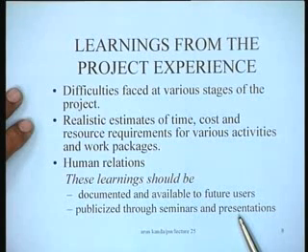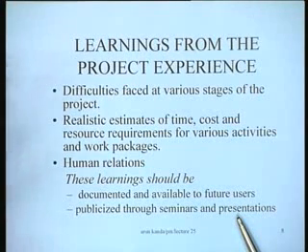For instance, if you look at a company like Engineers India Limited, which is again a project consultancy organization, when a project manager comes back after completing a project, let's say doing the Panipat refinery, when he comes back to his department, he should make a presentation, half an hour or 1 hour presentation, to all his colleagues, to all the staff, including the managing director, on what the experiences were like, what were the difficulties that he faced. And this presentation will help others to imbibe some of those learnings.